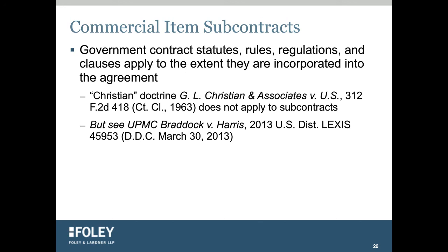I think the reason they came to that holding, though, and they did a footnote on Christian doctrine, but I think the reason they really came to that is the regulations underlying those EEO laws state that the clauses apply even if they're not in your contract. So they didn't even have to go to the Christian doctrine to reach that finding, and we still have yet to see the Christian doctrine applied to other clauses with subcontracts.